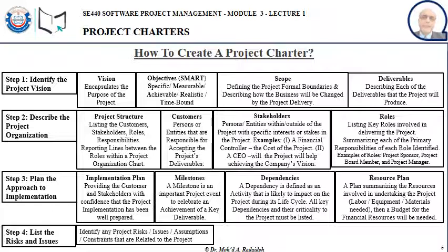Issues, well, it's like a sort of problems or concerns that we need to take care of. Assumptions are those conditions that we assume because things are not clear to us from the RFP, so we assume things. So the assumptions come from us as a service provider. The constraints are those conditions imposed on us by the customer. So we cannot fool around with them. We have to take them as is.